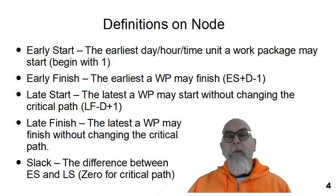The early start, the upper left corner, is the earliest time that the work package may begin. The very first one or the ones that start the network diagram would begin with a number one. Early finish is the earliest moment that we can finish a work package. For each work package, it's calculated by early start plus duration minus one.